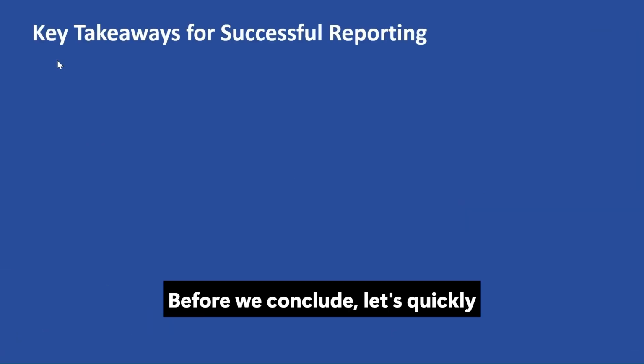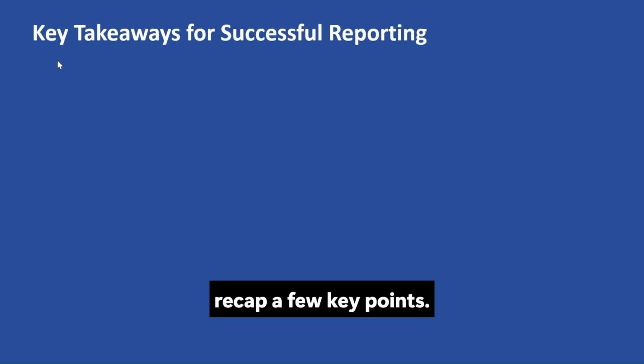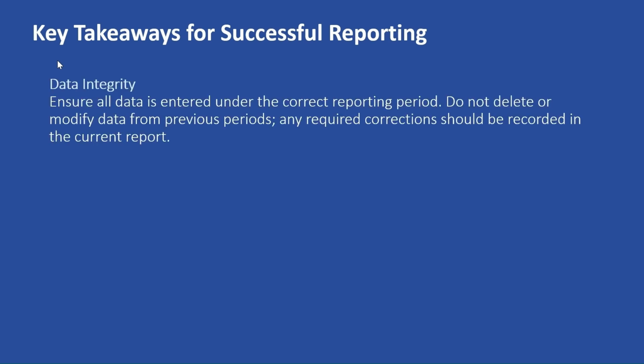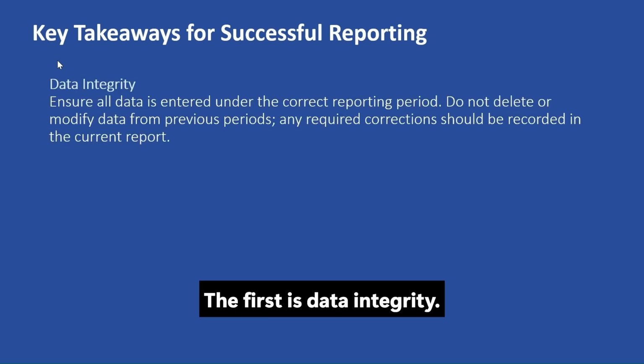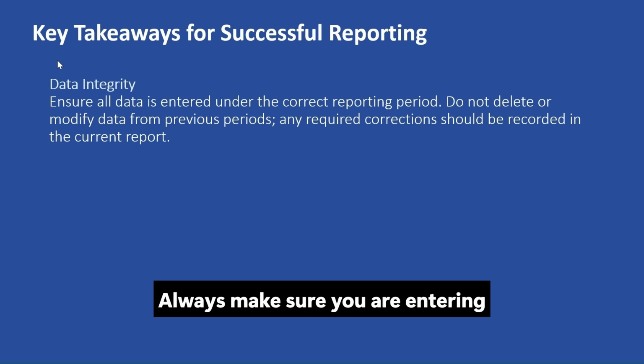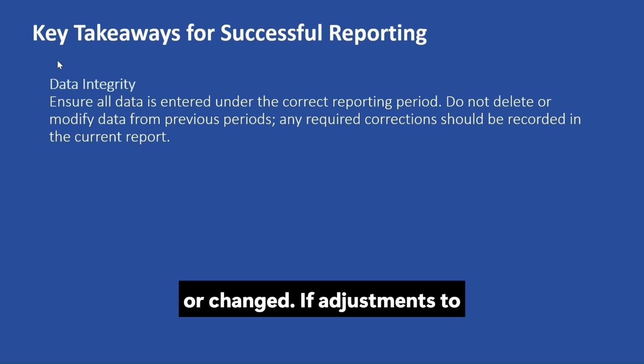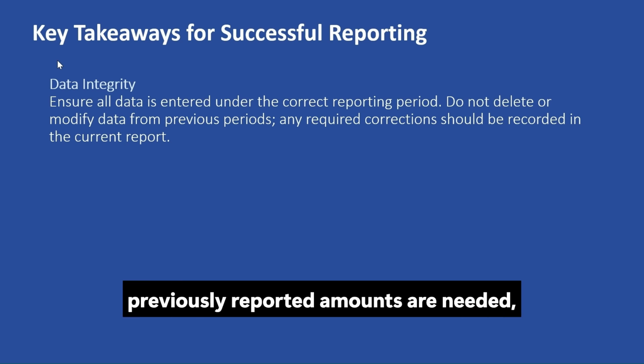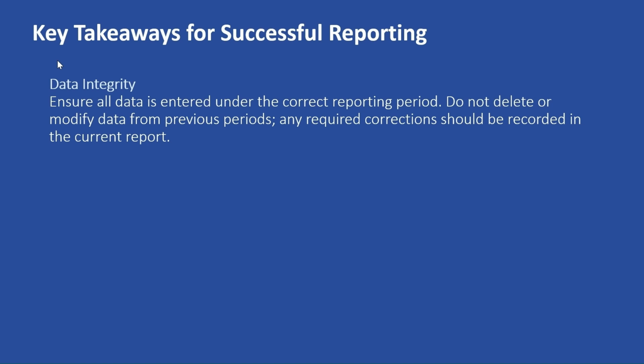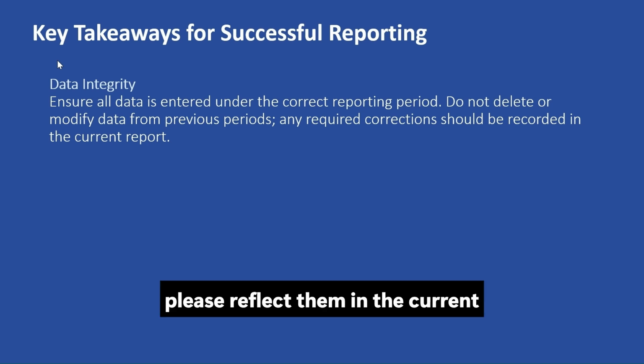Before we conclude, let's quickly recap a few key points. The first is data integrity. Always make sure you are entering information in the correct reporting period, and remember that data from previous periods should not be deleted or changed. If adjustments to previously reported amounts are needed, please reflect them in the current reporting period.